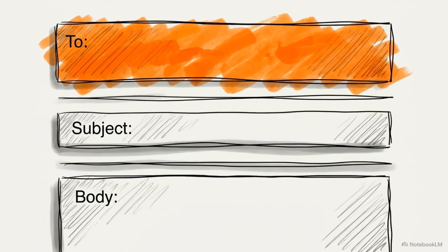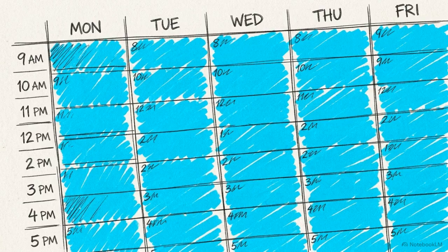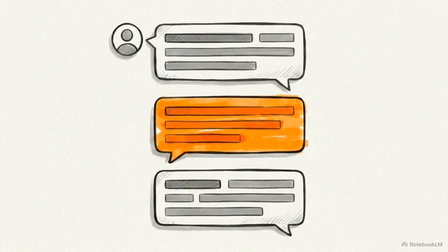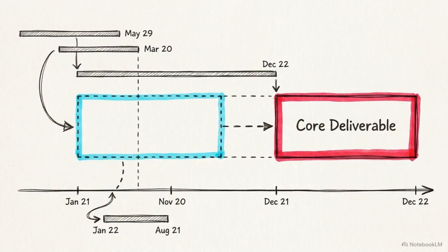This interface shows our template. Step 1 is to state the constraint. You start with facts, like noting the team is at full capacity. This depersonalizes the refusal. Step 2 is specifying the impact. Do not just say the new request will cause delays. Tell them exactly which core deliverable will be pushed back by 3 days if you accommodate this new feature.